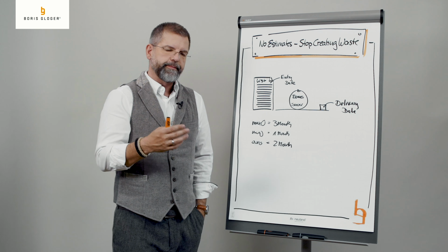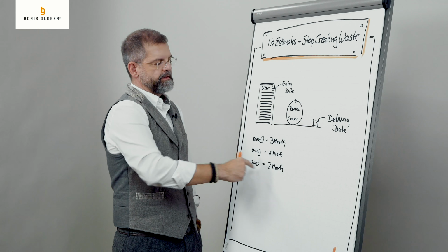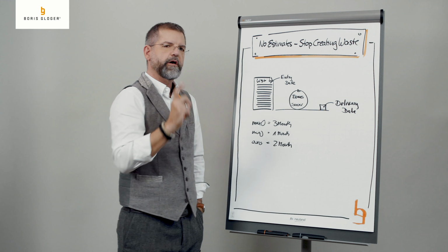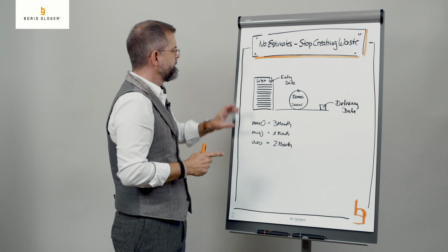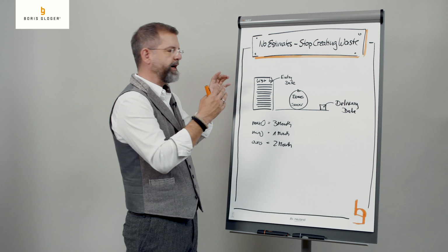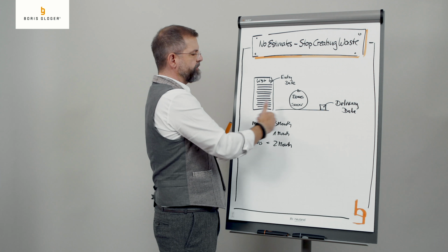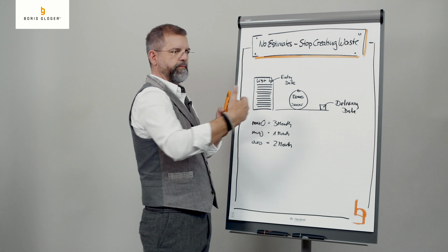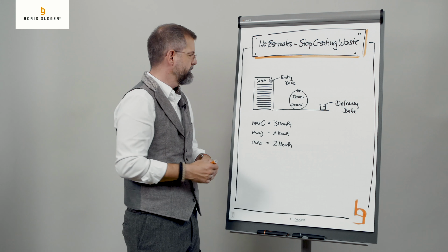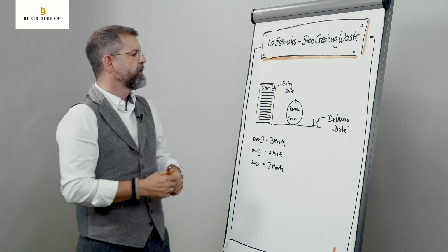What we also learned from the lean area is that all of these measurements make only sense if you stick to a very, very basic rule. You need to fix the amount of items in that list. So when you start with that approach, you have maybe a pre-filled list. Typically, that is what happens in an organization. They have already a kind of list of things they need to deliver, or teams have already a backlog that they have to deliver, and you fix that list.